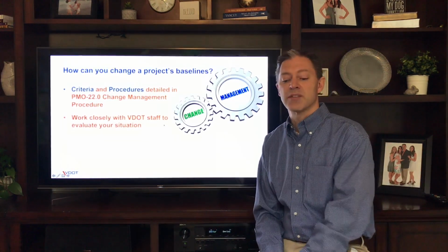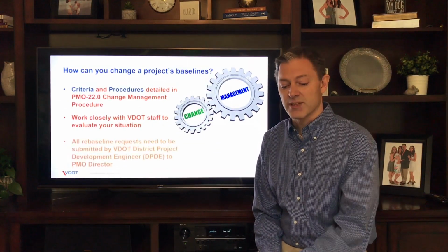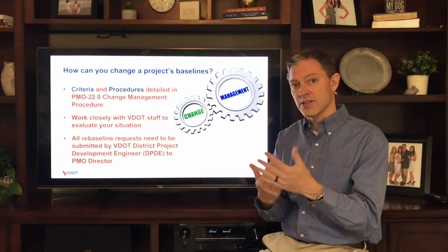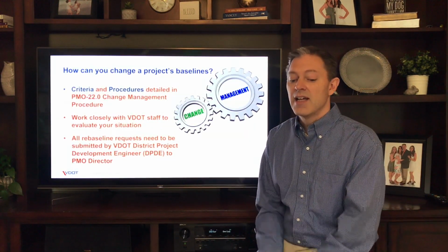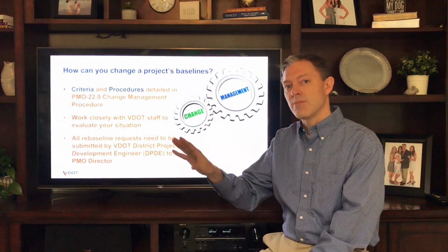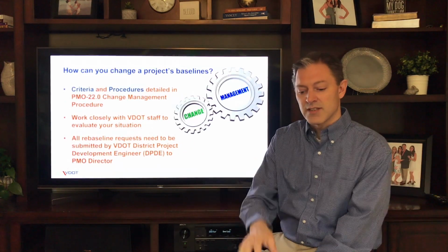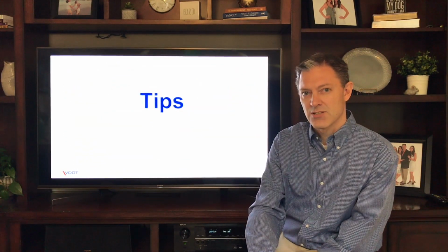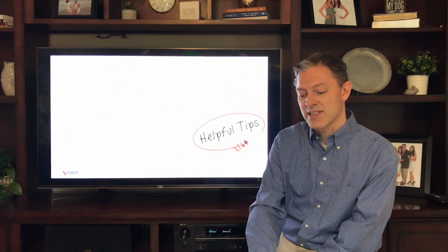You need to work closely with the VDOT staff to evaluate your situation, because it's just not a desire. There is criteria that need to be matched for it to be considered. And finally, all rebaseline requests, even locality requests, need to come through the PE manager within the VDOT district to me at the PMO. So let's talk about some tips.